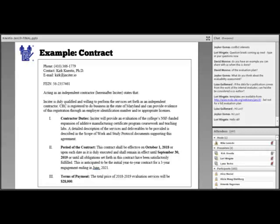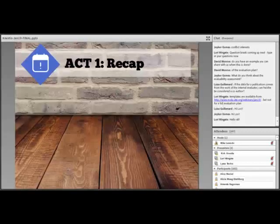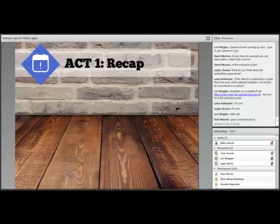So, and scene. Let's recap here. What did we hear? Or what do I hope you heard? Number one, again, timeline changes are super common. This happens all the time in our work. These changes can oftentimes be accommodated just by moving work around within an established contract period. The timeline details are defined in the scope of work, and if that's the case, we can tweak the days or weeks or months